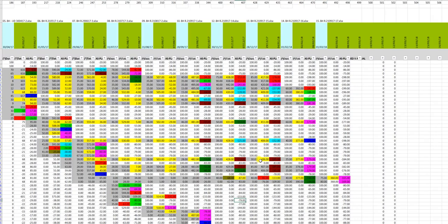From the two, an as-built critical path has to be determined. The lead, in my view, has to be the as-planned, the as-built factual path, with reconnaissance made to the dynamic critical path to put you in the place and in the position of the person that would have been at the time of making decisions to diverge from what was planned to be followed.